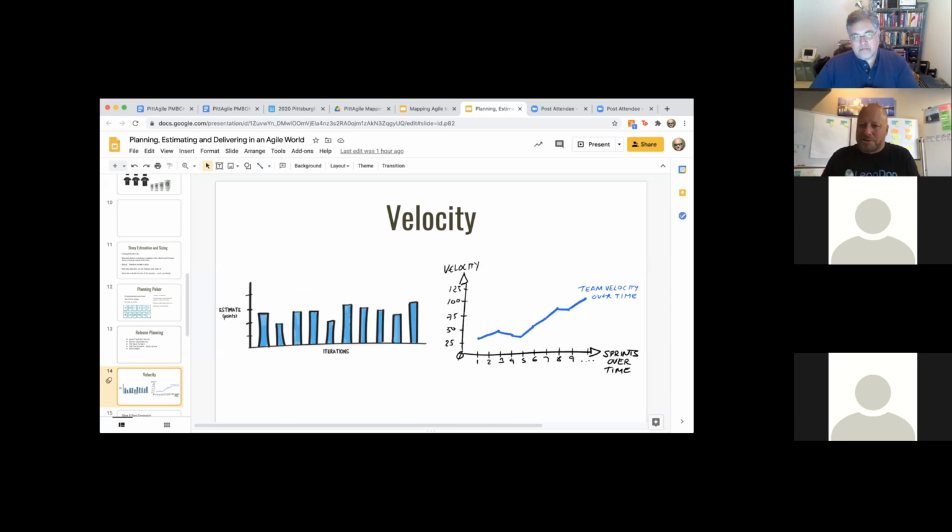So the Scrum Master, iteration manager will facilitate: hey, let's bring product owner A in, let's estimate their backlog. Now we're going to have another meeting with product owner B, and we're going to estimate their backlog. So the estimation and sizing, we will not do that. All the product owners don't have to be in the room. The release planning is when we need the multiple product owners in the room, because now we have one team.